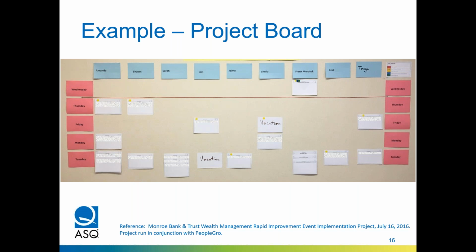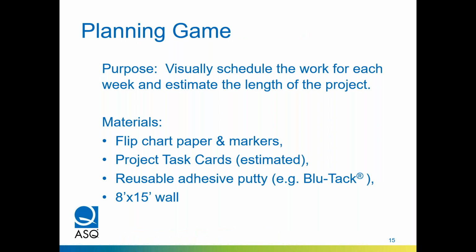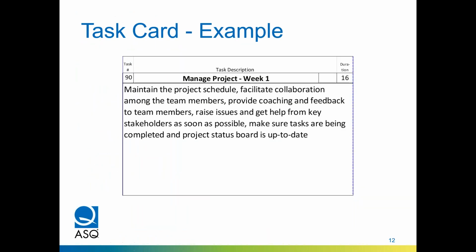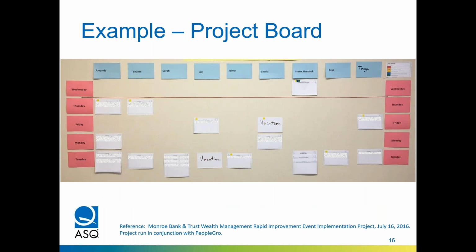The team goes to the planning game, and they strip off that first, let's go back to the planning game visual, strip off these first set of cards here, and together figure out how to distribute them. You know, who's going to do what, when during the week for that week. And typically, if it's going to take more than one day, the card is placed on the last day when it's expected to be completed. So this card by Tanya over here on the right looks like it's going to get done on Friday, okay?